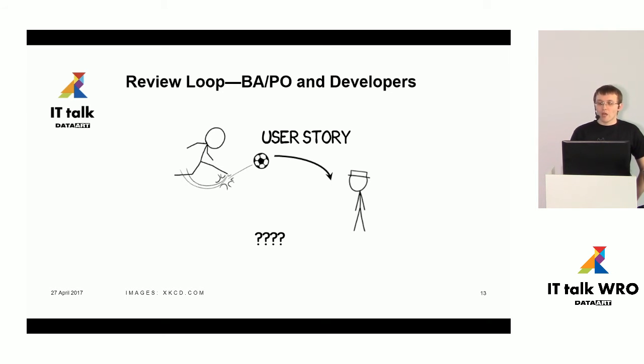That's true, but let's check the following analogy. We have a group of students, let's say, a teacher providing a new topic for them. Students will obviously ask questions, but that does not guarantee that students understand the topic completely. Unfortunately, we cannot run exams for developers on user stories. However, there is one other way to be sure that the person you are talking to understands your words. Just make that person tell the same information with his own words.